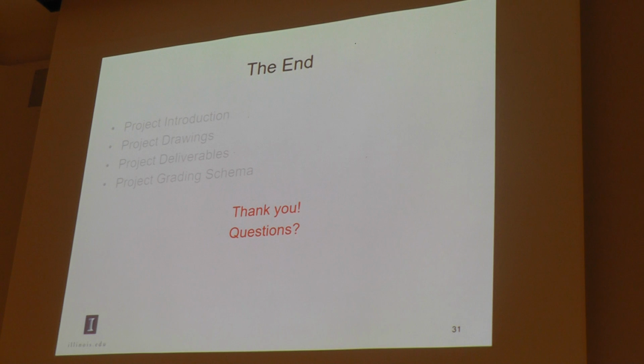Yes, here we have two scenarios. If you really can find the supplier from California, that's the best case scenario where you can use their data to do the estimate. What if you cannot find, for example, you cannot find from California, you can find from Illinois, you need to adjust because we have certain factors for that. We need to adjust the cost. So for the RSMeans estimation, RSMeans use California. And for the other state work, we should get the prices too. Yeah, also. We get Illinois and we adjust the prices, right?